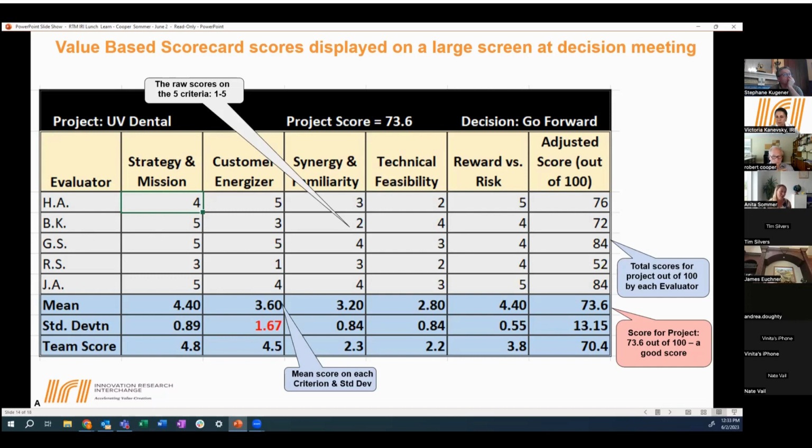Research shows that, even though it's a subjective measure of complexity that you show with the planning poker card, when you use it as a dialogue tool across the room with a group of experts, you actually get a fairly accurate result, especially when you compare across different projects. It will rate the project relatively in the portfolio to a quite high accuracy compared to gut feeling or who shouts the loudest in the room, right? So this is a way of quantifying value in these 5 categories.